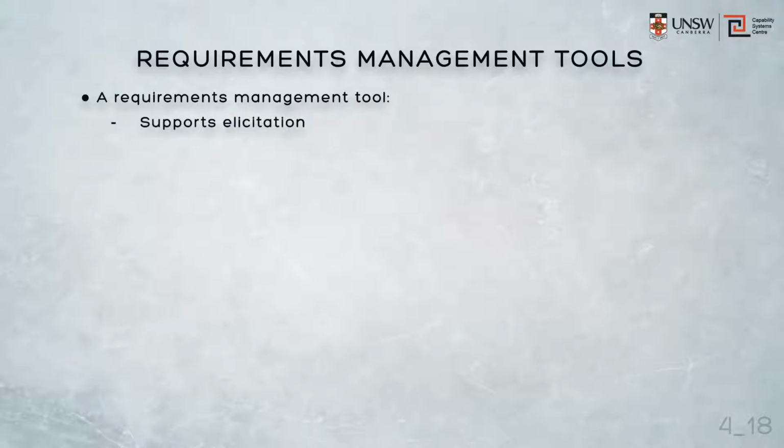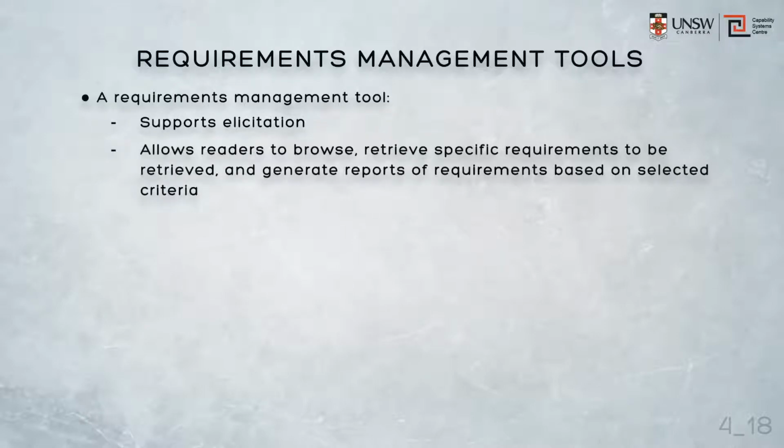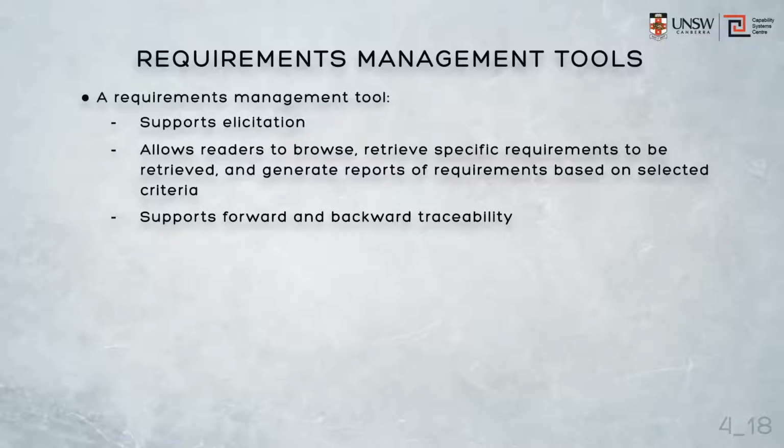First, it needs to support elicitation and allow requirements engineers to capture requirements as they're gathered. Once the requirements are captured, the tool should allow readers to browse the requirement set, but also to retrieve specific requirements and to generate reports of subsets of requirements based on selected criteria. The tool should also support traceability, to support forward and backward traceability, to allow investigation of how a high-level requirement is achieved, as well as to identify the origin of any lower-level requirement.